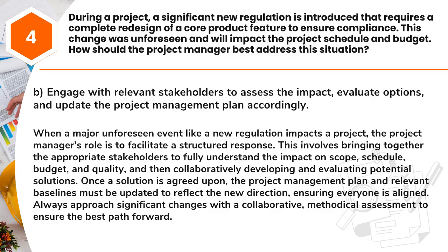Once a solution is agreed upon, the project management plan and relevant baselines must be updated to reflect the new direction, ensuring everyone is aligned. Always approach significant changes with a collaborative, methodical assessment to ensure the best path forward.